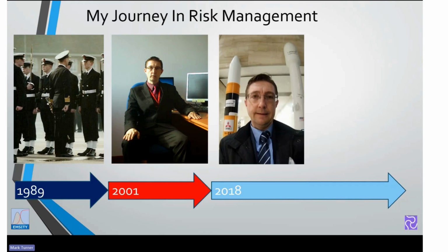Now, the story behind this is I'd been working with Safran on and off for a couple of years at that point, and we'd been testing and having some trial licenses of their Safran Risk product. But what I recognized as being a risk manager was that I'd only be using the risk analysis 2 or 3 times a year on the projects which I was working with. So each project I would use it 2 or 3 times a year to run my half-yearly or quarterly analysis of my risk register to determine if I had sufficient contingencies, if I was on schedule, if I was on cost, and those types of appropriate analysis of the software.